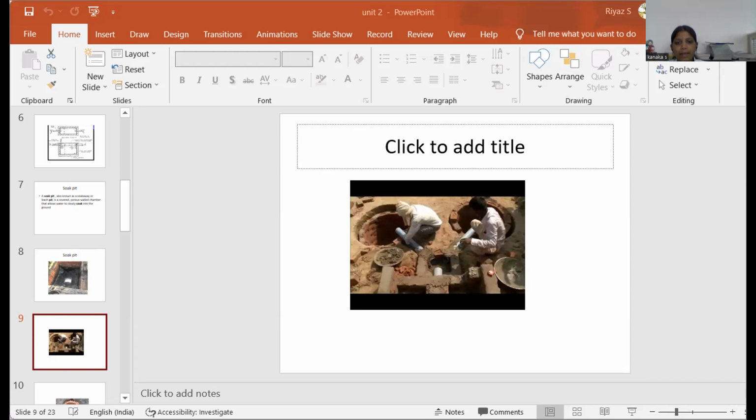It is usually carefully prepared as a detailed estimation. The classification depends on the purpose of the detailed estimate. The type of estimate made by the engineer consultant is usually for the purpose of financing work and for checking bids and the running bills submitted by the contractor. So this one follows the rate analysis table.